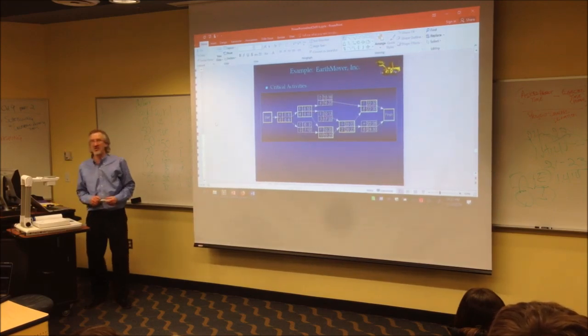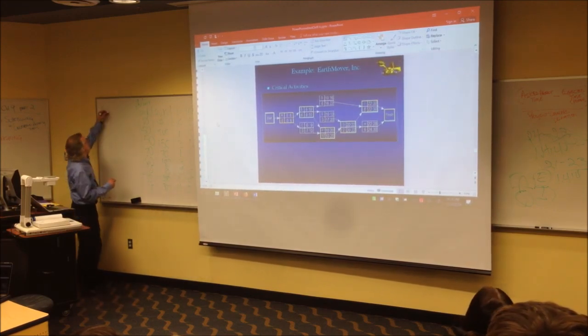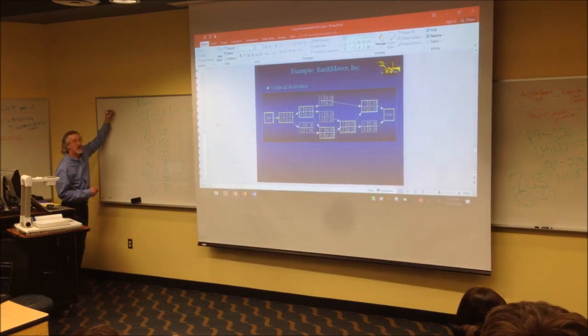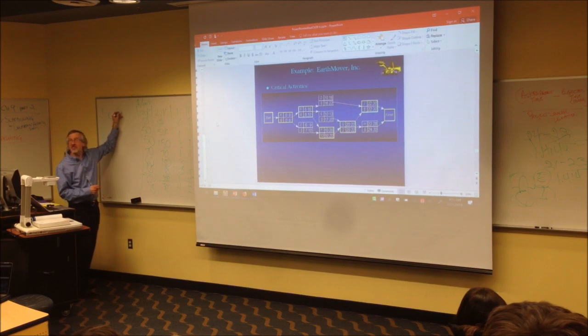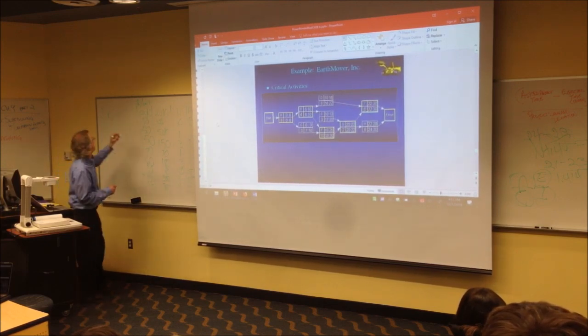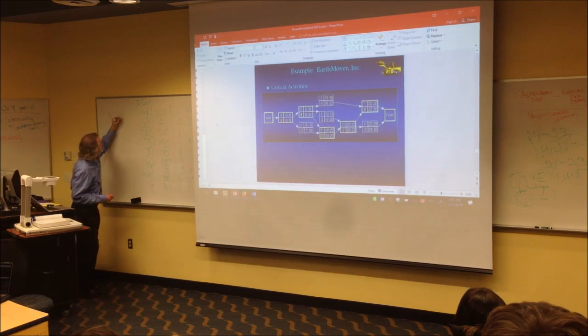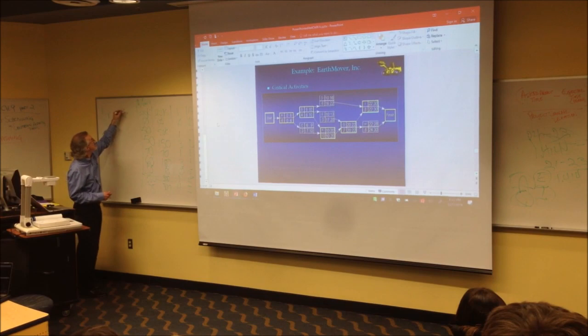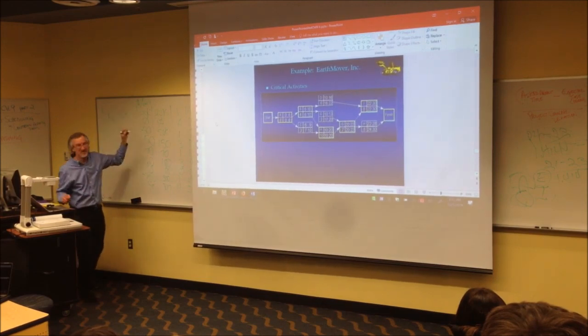Activity H. What do I start with? X sub H. Thank you. Now what? Greater than or equal to what goes here? X sub what? G. That's right. Whatever the X variable for whatever precedes it. Now what's next? Plus, parenthesis, 6.